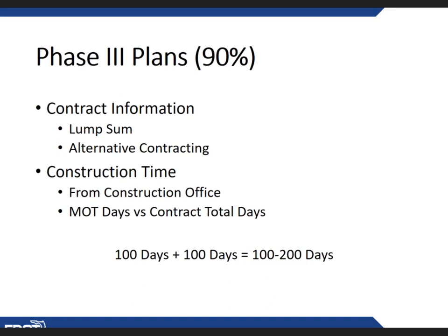It does need to be evaluated for which work can be done simultaneous with the other project, and looked at on a project by project basis to see what the needs are. And that's just like you do with your own schedule. During your own schedule, you might have multiple work items going on at the same time. So same thing with the construction. We can shorten this timeline or keep it at 200 days.